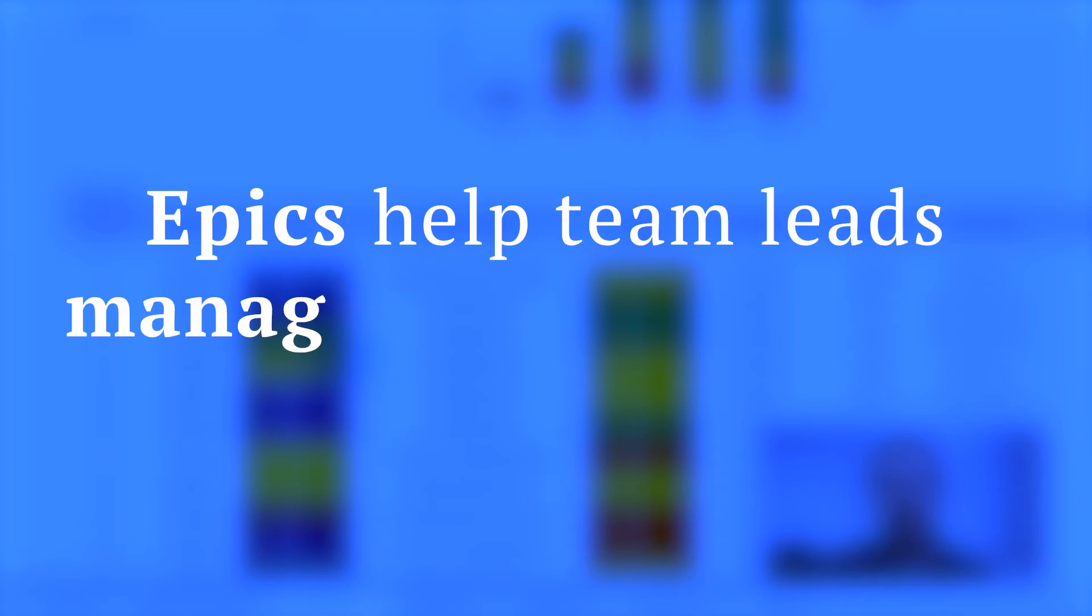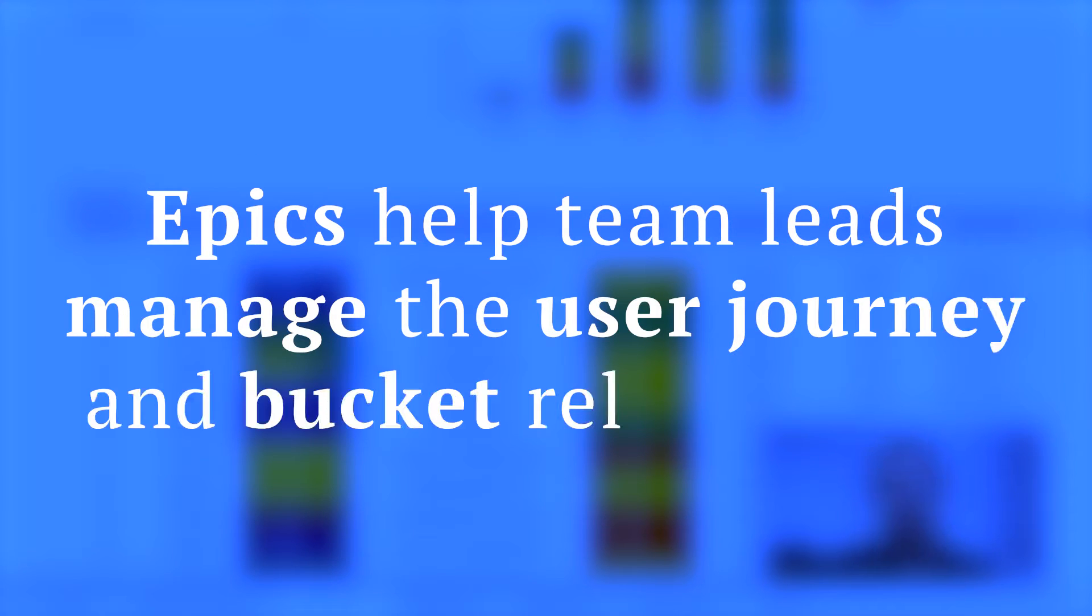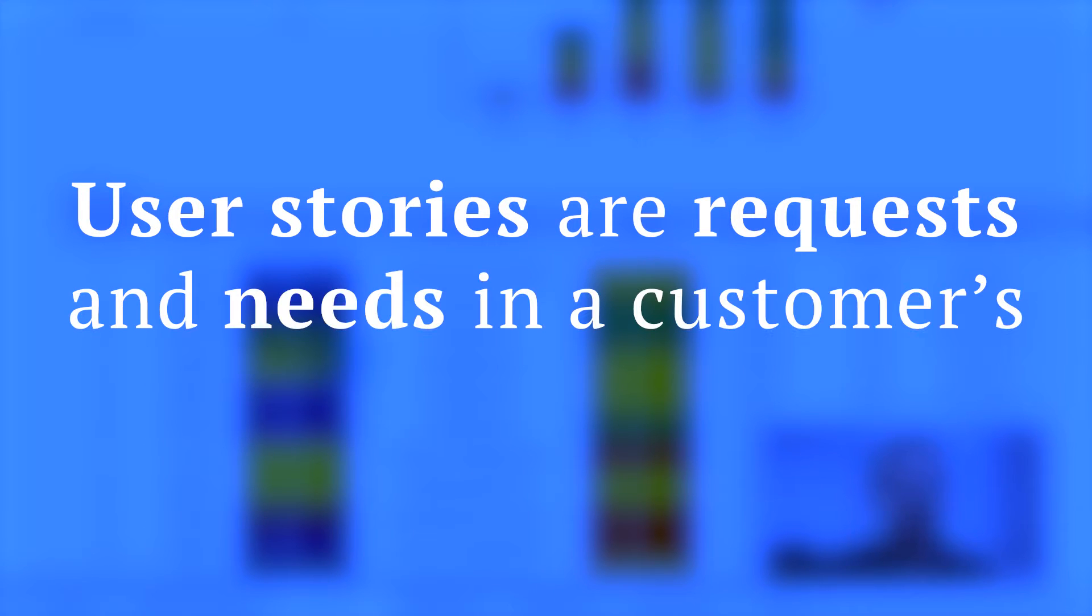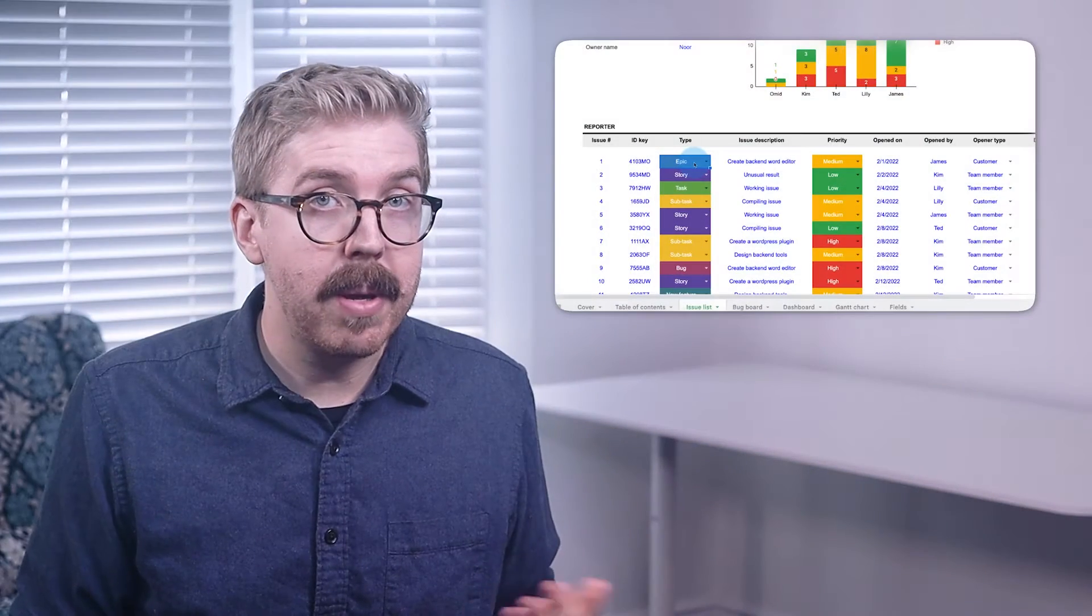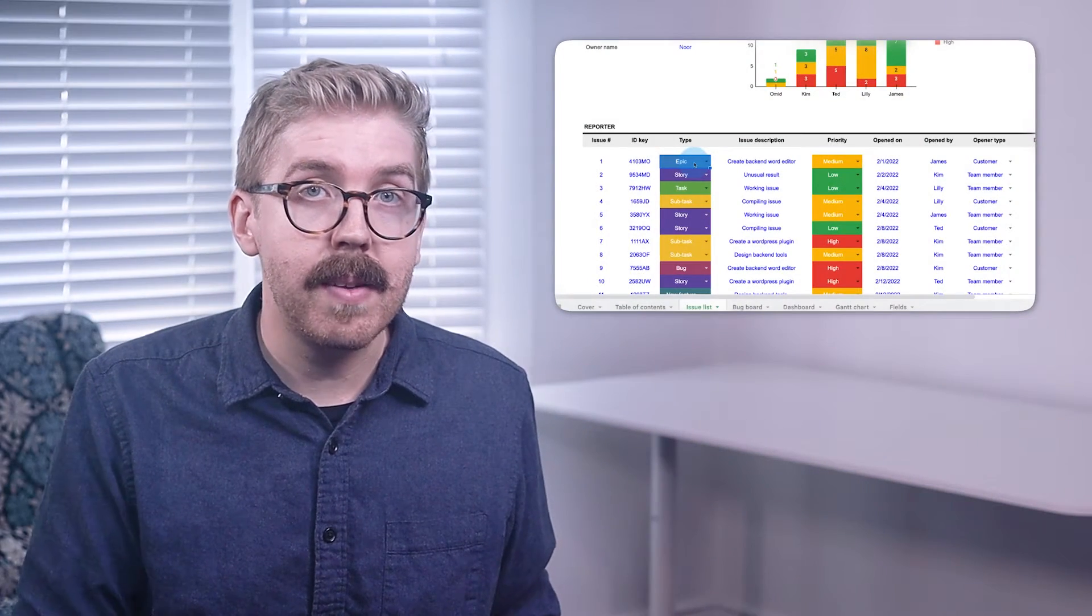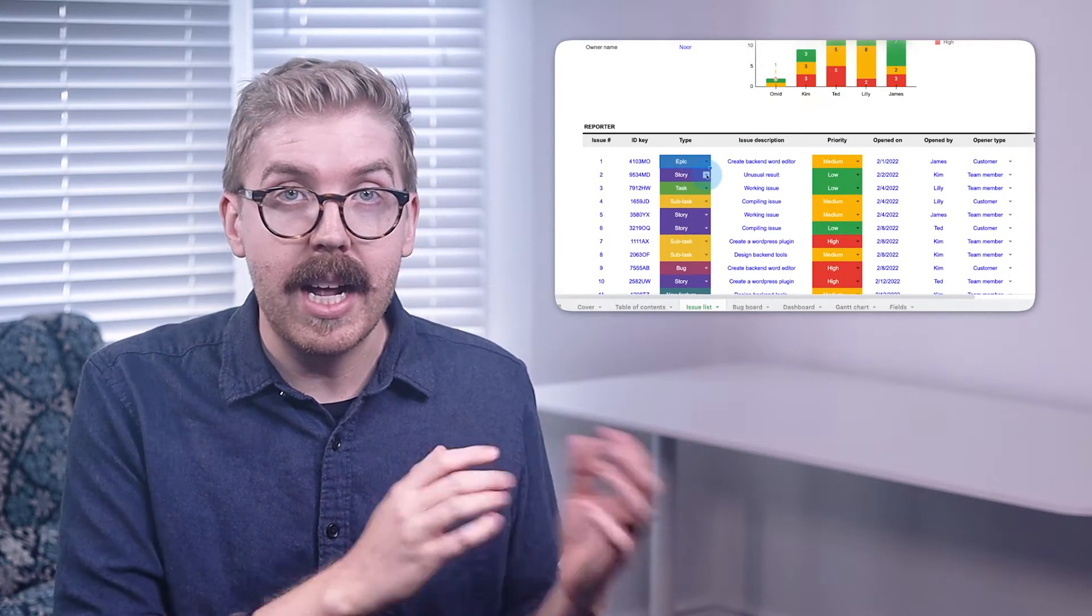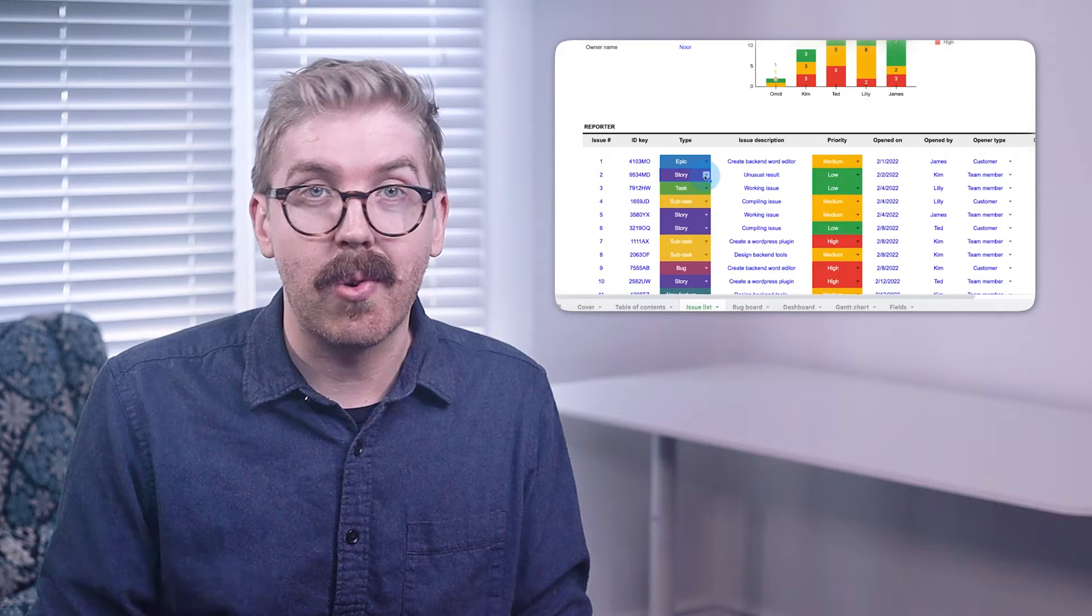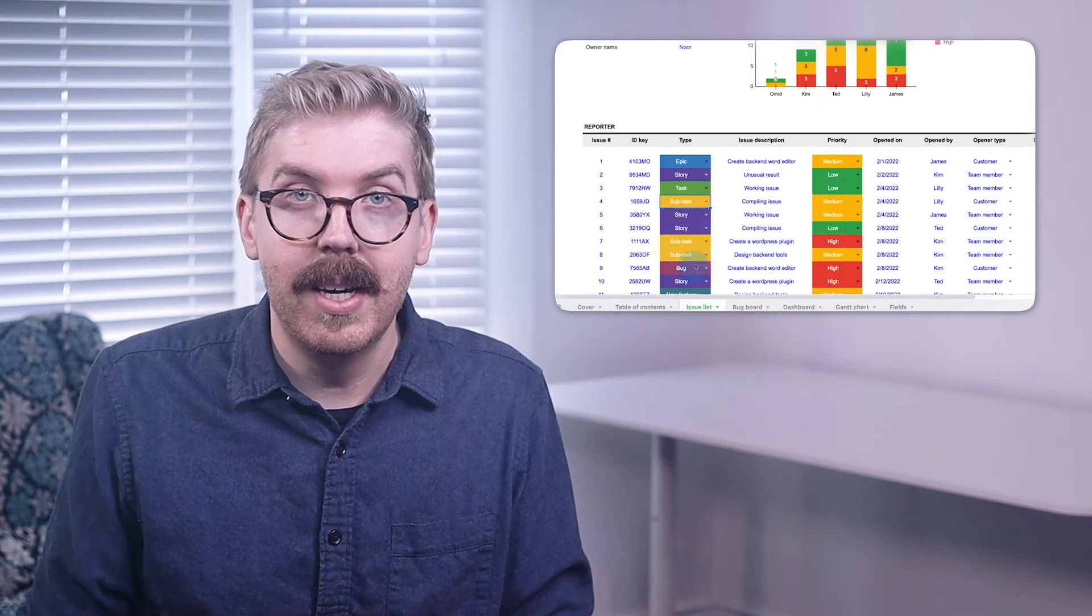Epics help team leads manage the user journey and bucket-related tasks. User stories are requests and needs in a customer's user journey. So if you're a PM that needs to manage a huge project, you place it in an epic, which is then broken down into stories, tasks, and subtasks.